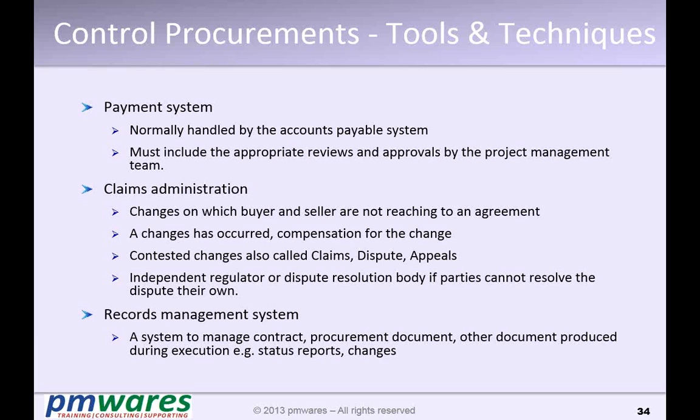Before you close the project, you have to close the procurement, and before you close the procurement, you have to close all the claims and all the disputes. So you can go to the various associations, arbitrators, or court of law if nothing is working out to settle the disputes.